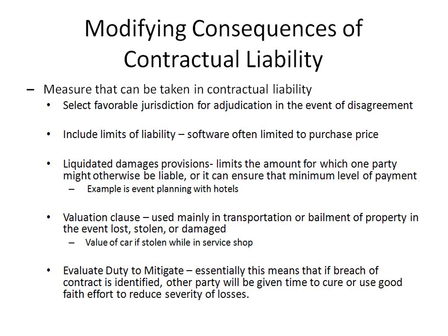A liquidated damages provision limits the amount for which one party might otherwise be liable, or it can ensure a minimum level of payment. So if I was supposed to receive $5,000, and I'll use an event planning example, since this is where I typically see it quite a bit: I have to guarantee at least $5,000 in food and beverage sales, and we only get $4,000.